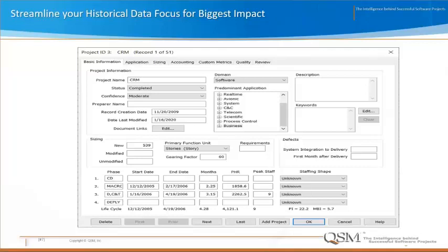To give you a little background, the PI is a macro measure for productivity and efficiency, and it takes into account the overall project environment, including things like experience level of the people, tools and methods you might be using, complexity of the work that you're delivering, and the overall maturity of the process. I'm defining that for you now because we're going to be talking a lot about productivity as we go through the webinar, so I wanted you to be a little bit familiar with that measure when I mention it.